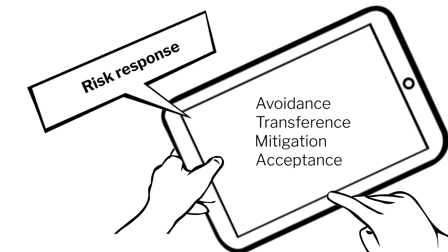Risk avoidance involves eliminating a risk or protecting the project objectives from the impact of the risk. Risk transfer seeks to transfer risk to another party and to give the other party the responsibility for the risk response. In the context of project management, risk mitigation may involve various actions to reduce the impact if a specific risk should occur. Risk acceptance involves a decision to leave the project plan unchanged and not to implement any risk avoidance, transference, or mitigation strategies with respect to a specific risk.